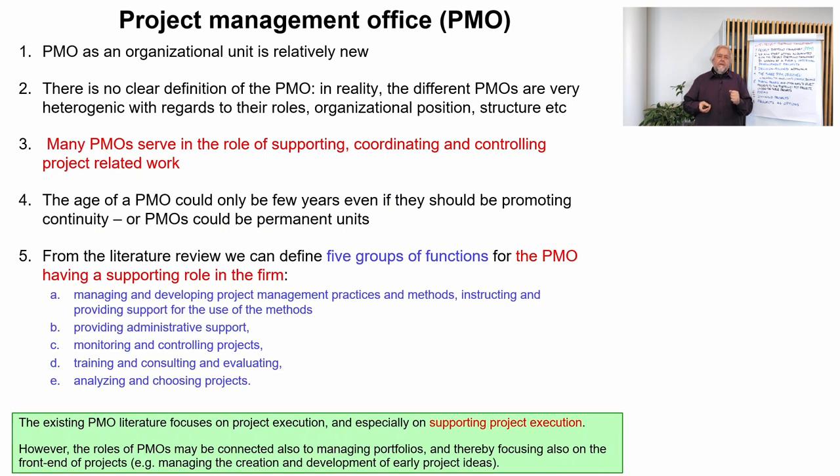The fourth one says that the age of a project management office could be only a few years. Sometimes project management offices are established just to support the initiation of project management practice in firms. And when the practice is going on successfully, there is no need for such a support organization anymore. But in many organizations, they are very permanent units that take care of or support project-related activities.